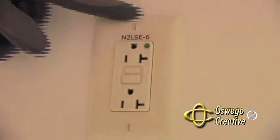And that electrician can go in that room and install that equipment, check everything out, walk out. He's got a baggie full of trash. The room is completely clean from where he's done. He's not pushing a cart around. That CAD coordination drawing can get signed off by an electrician and sent back into the office. And now they have a quality control checkpoint of how they have just walked through an entire trim out phase in about a third of the time that would take normally.